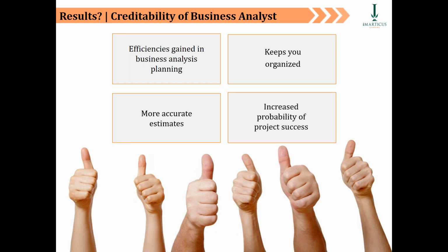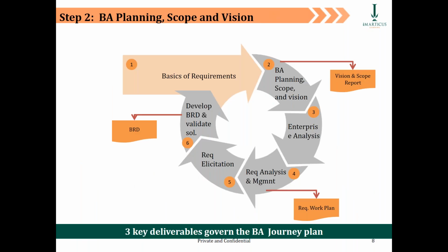Largely, the quantifiable benefits are the effort part. Remember, it's a 1,000-day project. But as a thumb rule, the BA gets about 15% of the project timeline, which is about 150 days. Now, 150 days is typically 5 months. But only if you do planning and give them an effort, matching that effort to those 5 months, you know that in 5 months you'll be able to complete all activities from a business analysis perspective, create the deliverables, take a business case sign off, take a requirement sign off, and then go ahead. That's why you need that kind of detail.